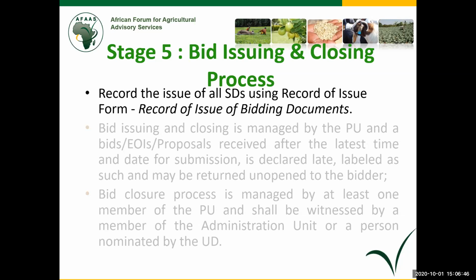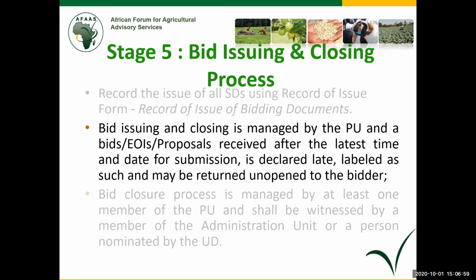Where they deliver manually, they sign in the manual form. Where they don't, it's the administrator who prints and records for them in the form, including the dates. So bid issuing and closing, I've already explained how it is managed, but you must always ensure that those that bid past the time of submission are not accepted.